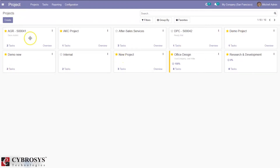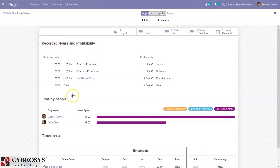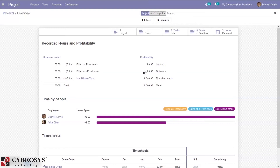One task is created for this project. If you click the overview, you can view the project's recorded hours and profitability. Since we added timesheet lines, we can see total hours recorded is 3, which is 100%, and the timesheet cost is negative 300. This timesheet cost is calculated by multiplying the time spent by the employee by the timesheet cost per hour set on the employee.